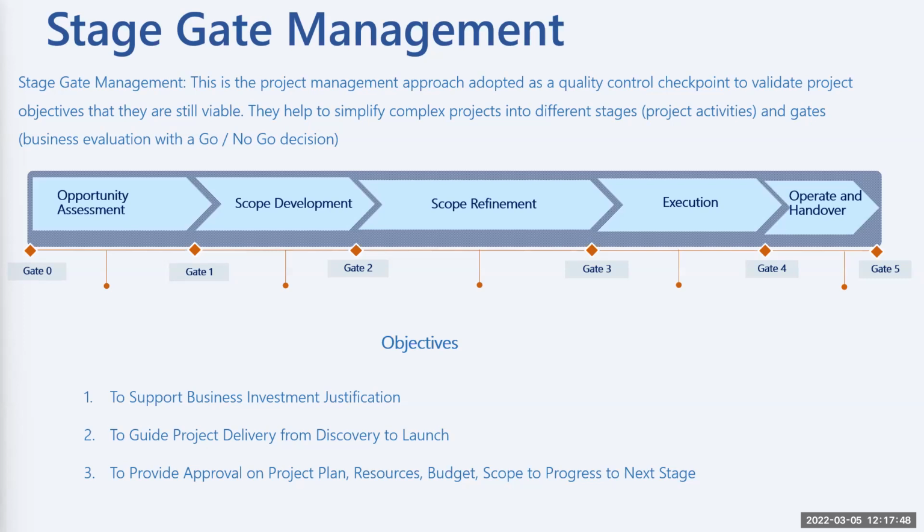And it is also provided by the SMEs, the subject matter experts, alongside the project managers. They will give you direction to say at the beginning of this project, these are the key things that need to be done. They are broken down and they are usually in the investment management framework or governance framework. They will highlight that this project, given its type, complexity or value, needs to go through these phases of project delivery.